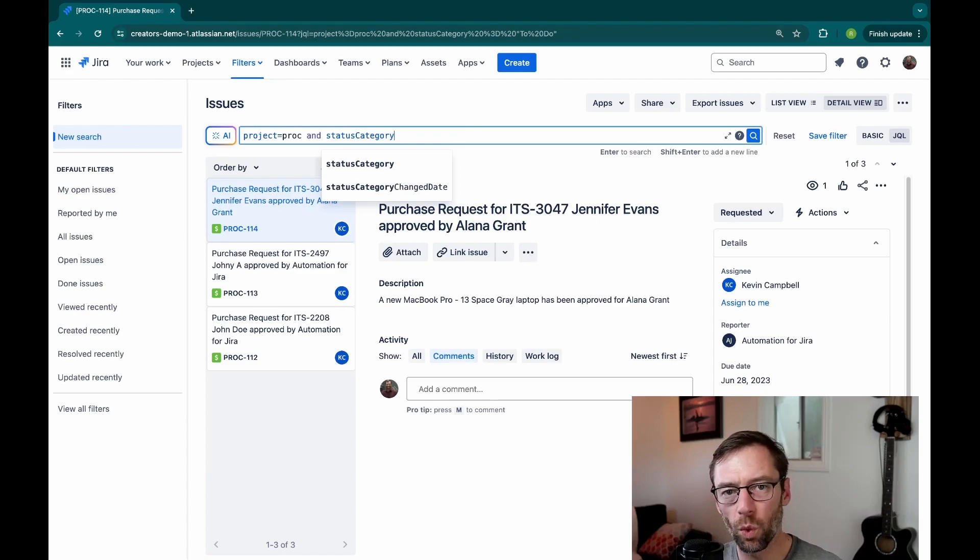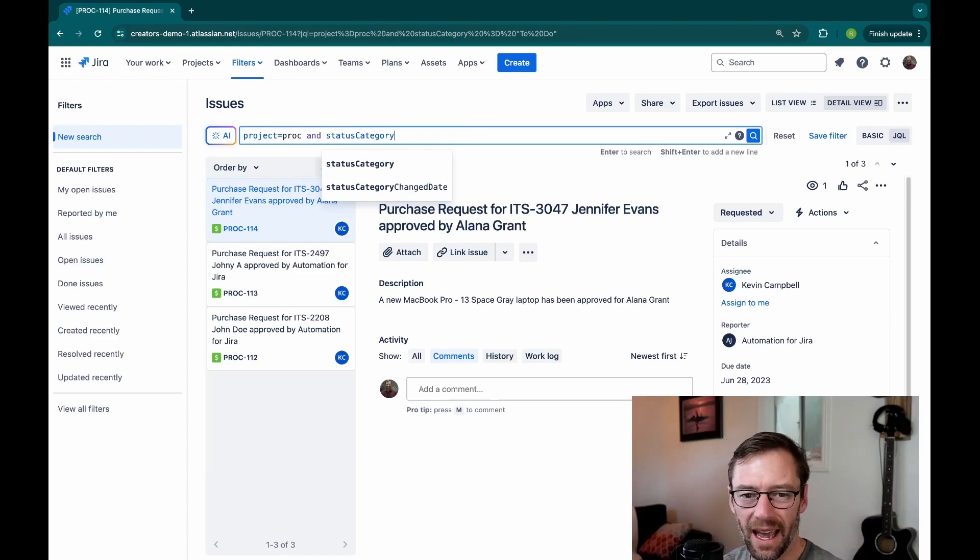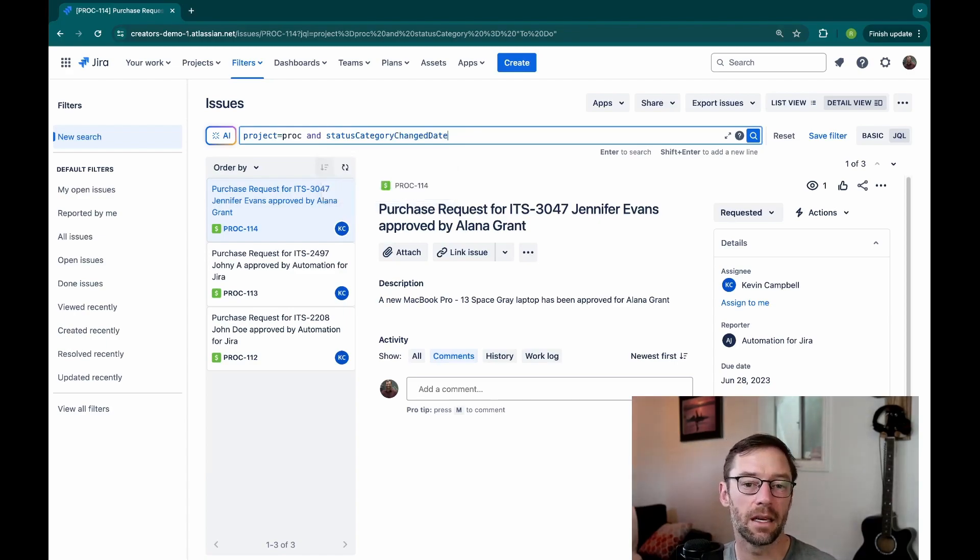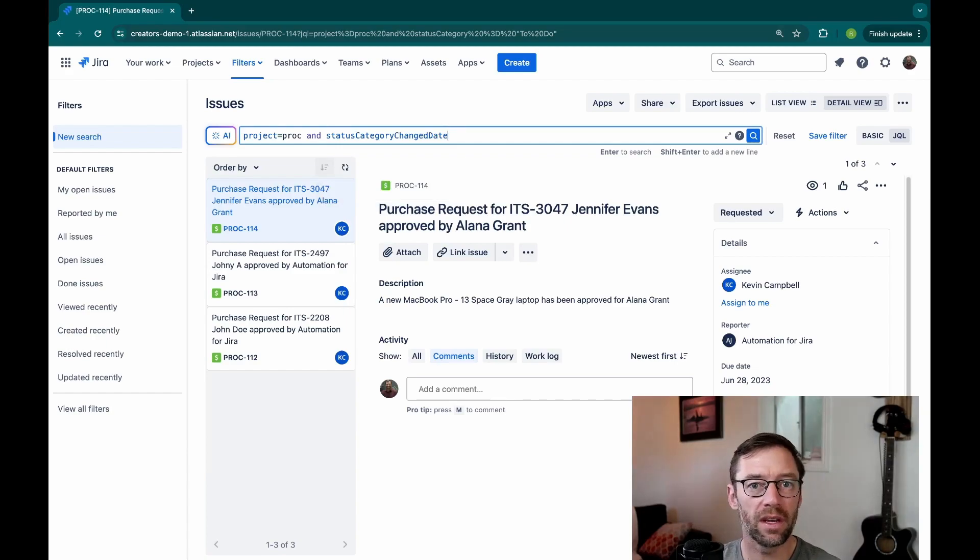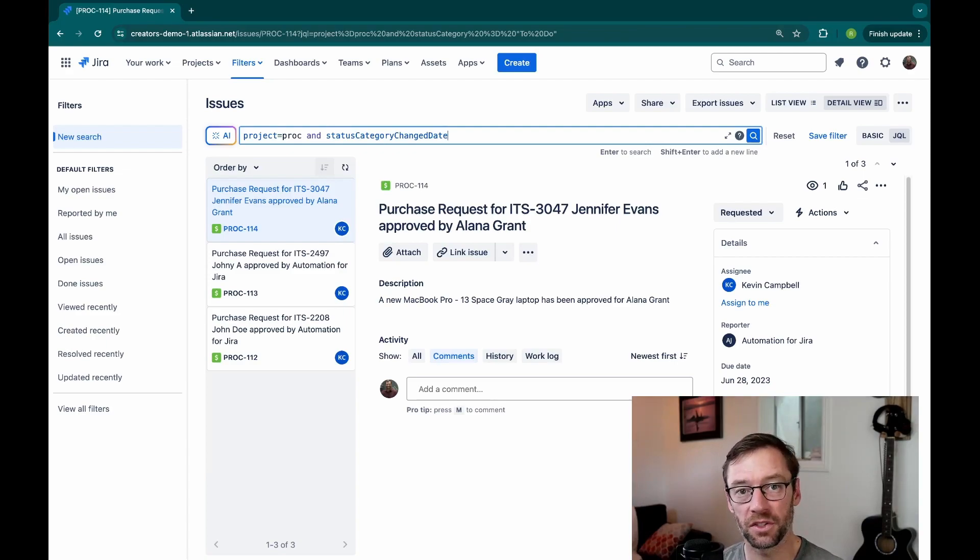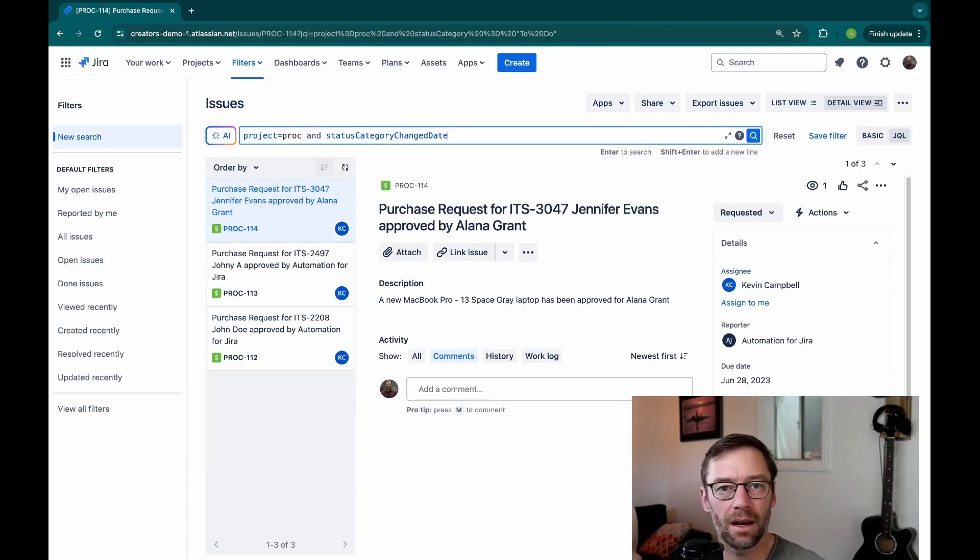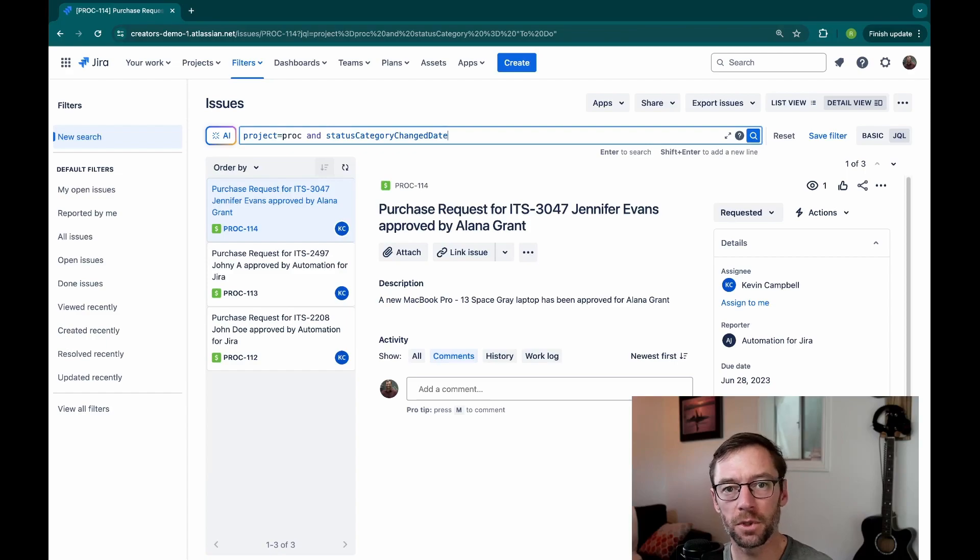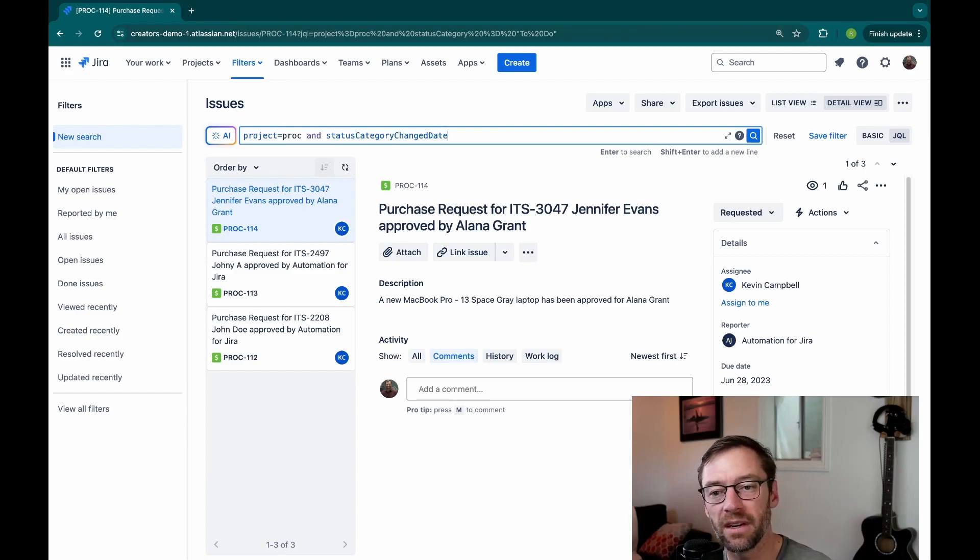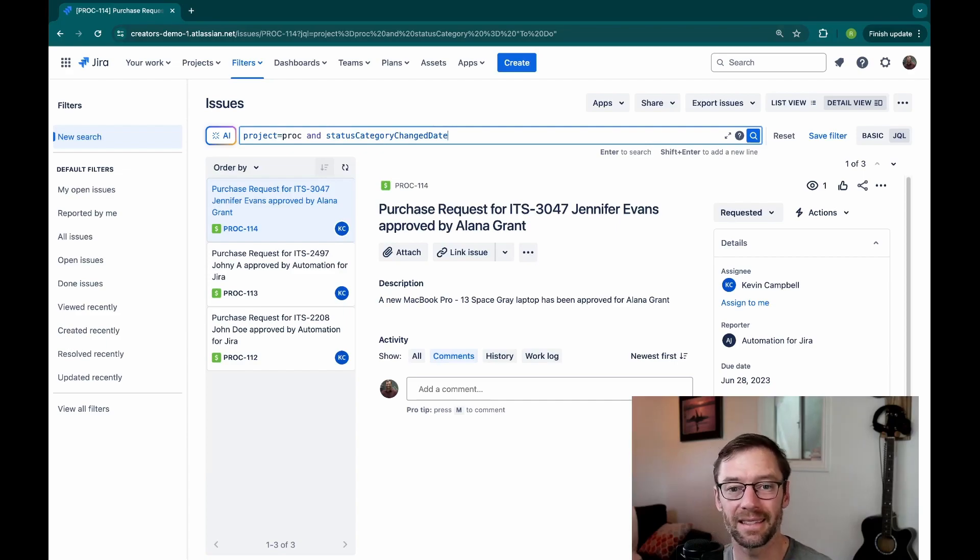Now there is one more field similar to status category, and that's status category change date. This will let me query for any ticket or its category shifted, maybe from in-progress to done, or from done to to-do, or any combination thereof. This helps me track how tickets move through the workflow without having to know the name of every single possible status.